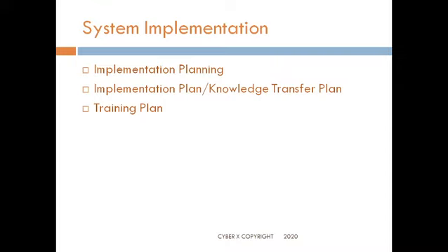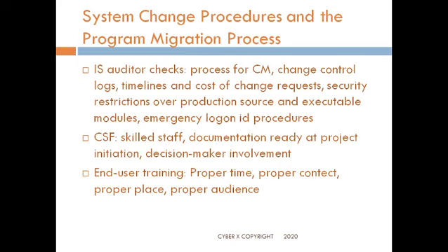System implementation. So what are the points one needs to think about while doing a system implementation? So there has to be a proper implementation planning. I cannot just be haywire and do an implementation. I need to have a proper knowledge transfer plan. I need to understand whether people have those skill sets or not, whether I need to upgrade the people to those skill sets, whether I need to retrain people, whether I need to get people with those skill sets. So a training plan needs to be built out.